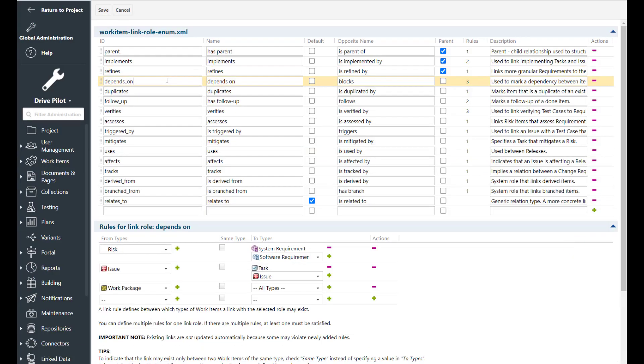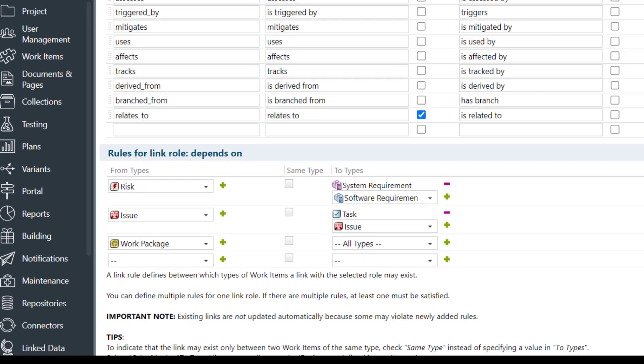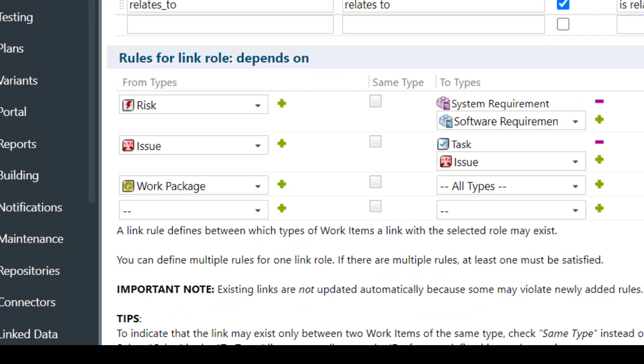The depends on link role was initially created to represent the dependencies that you can have between activities or between work packages. So that you can only start one activity when the other has been finished. But in the meantime it is also used to represent dependencies that you can have between issues or defects. So for example you can only fix the first defect if the second one was fixed before.